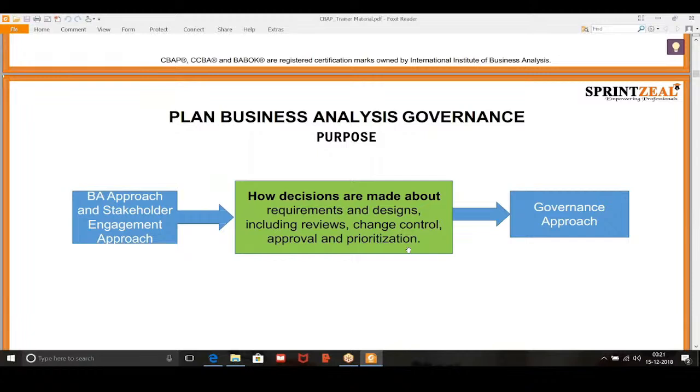So I think that's a valid point, that we need to highlight the risk. Another approach that we can capture in this business analysis governance is that we ask both stakeholders about the MVP requirements. Let's say the marketing person wants to roll out certain product features in January before February. We can ask the marketing stakeholder to deprioritize some of the features which are not that important. So a decision could be made on that basis, and I think that aligns with the risk you mentioned.